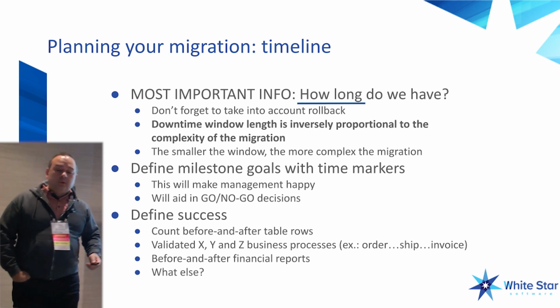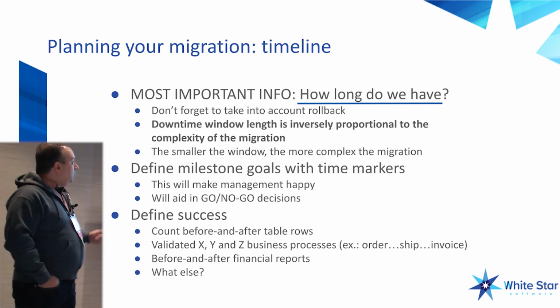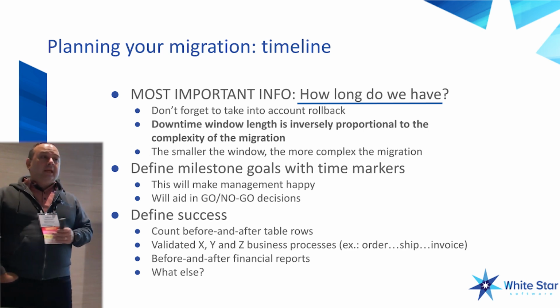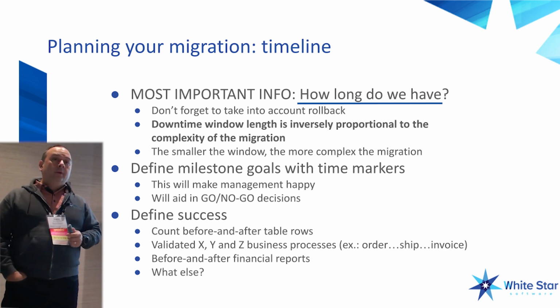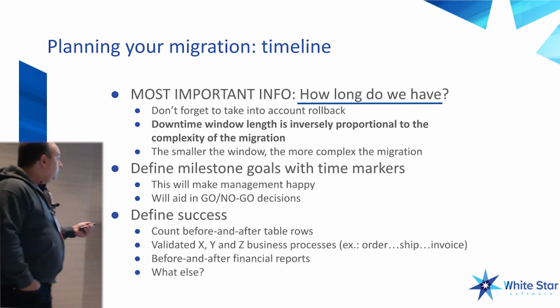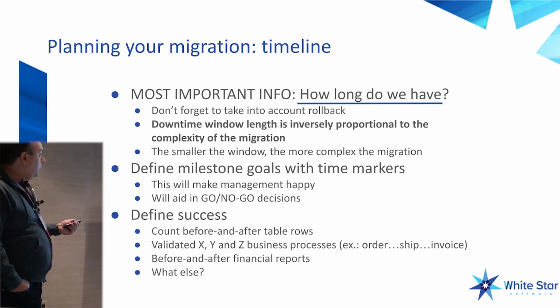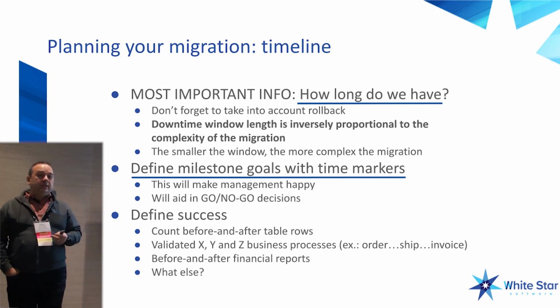Okay? And I talked about this earlier, right? So how much time do we have to do our migration? And don't forget that you have to take into account rollback time, right? So what's your drop-dead time? Yeah. Your go, no-go drop-dead time. And this, I think, is probably the most important one that I tell people here: define milestones and goals with time markers. So there are two reasons we do that.